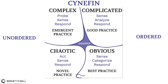Let's take a look at this little squiggly wave, which relates to a unique kind of boundary between obvious and chaotic. When we treat all problems as obvious, we get complacent — we assume nothing will change, that it's always worked, therefore it always will — and then suddenly something does change, and our standard processes don't account for that. Now we move rapidly into chaos, where recovery is difficult and expensive. Snowden's article in the Harvard Business Review calls this transition from obvious to chaos 'falling off the cliff.' Most of our management efforts should be focused in the complicated and complex domains, only using the obvious domain for things that are low risk and appropriately predictable to avoid this potential to fall off the cliff.